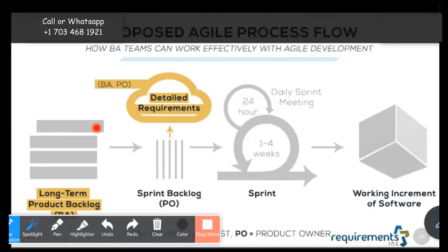Before we get to how much we pay them, what are the hours worked, right? So the first user story is all about that. I'm sorry, the first feature is all about that. Get the hours information into the payroll system so that it can be processed systematically, and do this every 15 days. That's the essence of this first item. Now, to achieve that, what are the different smaller pieces that need to be implemented? The team gets together every time they're about to start a sprint, and this is called a sprint planning meeting.